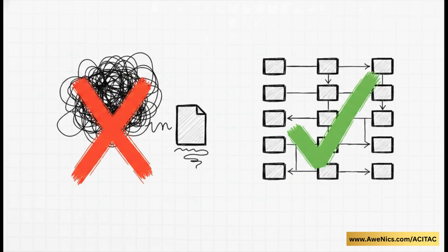Now that you've got that copy, you've got to name it. And please, don't just call it Calendar 2. Name it logically based on what it actually does. For example, some folks might use RoadCal for a road construction project. But an even better, way more logical naming convention is 6x9 Workweek Cal, right? Just by glancing at that name, you instantly know this calendar runs 6 days a week, 9 hours a day. It keeps your database squeaky clean and it's crystal clear for anyone else who might open your file.